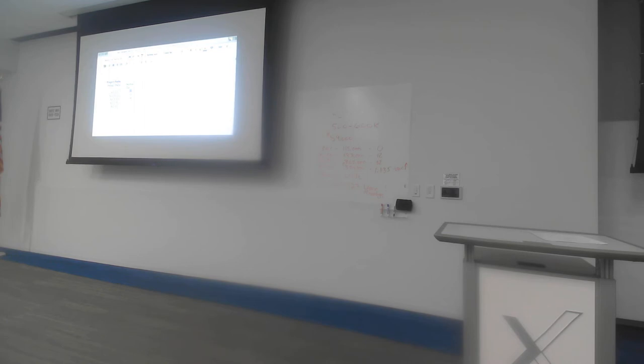At this stage, we're almost ready to start thinking about crashing different activities. But before we do that, again, I want to go back here and think about this normal versus crashed amount of money here in terms of cost. We want to really keep track of exactly how much it's going to cost us to crash each of these different activities. And the whole idea behind it is we prioritize the ones that are going to allow us to crash the overall project duration, but also allow us to do that with the least amount of cost to us.